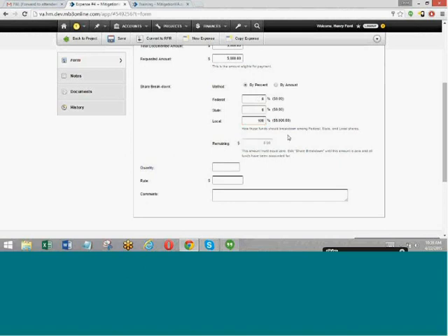You want to use the full expense to come off of your local share. So you can do that at the expense level. The next expense you might want to say, well, I actually want 100% of it to come off of my federal share. And the system will keep track of that. At the end of the day, they'll only pay 75% federal share, whatever state share there is, they'll pay, and the rest will be local share.